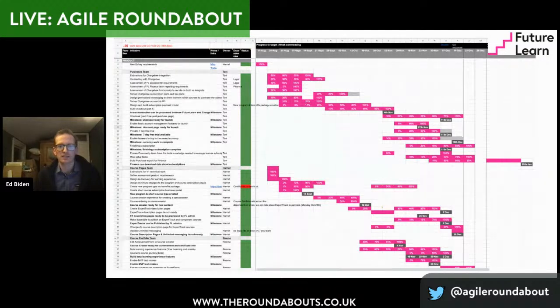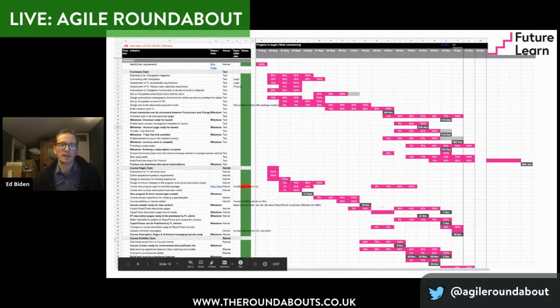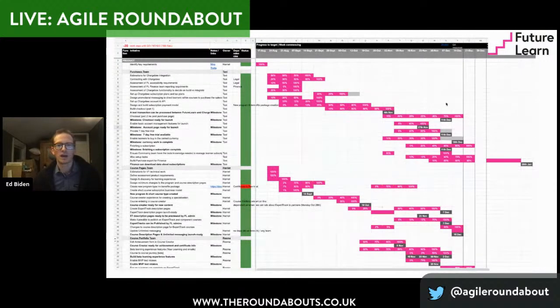This is Expert Tracks, and you can see here that this is a weekly tracker. Every column in here is one week. This spreadsheet actually goes down quite a bit. It covers not only the product teams, but also operations, marketing, sales, every team that was involved in delivering this. And we can plot out all of their progress. For each week, we're basically tracking their progress on each of these things. So if any team's falling behind on any piece of work, we know within a week, and we can rectify it within a week. And you can actually see what happened at the top here.